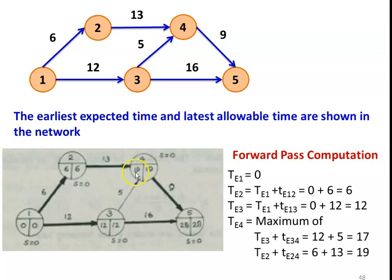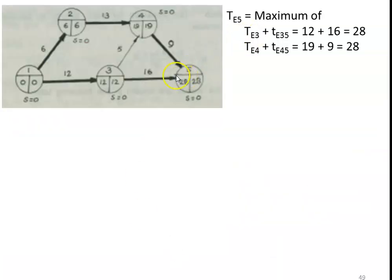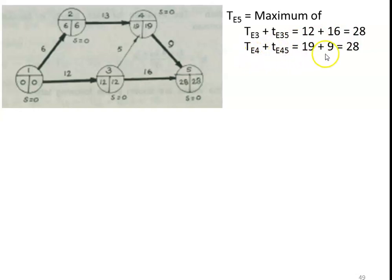So TE4 = 19. For the fifth event, there are again two incoming arrows: TE5 = maximum of (TE3 + t(3,5)) = 12 + 16 = 28, and (TE4 + t(4,5)) = 19 + 9 = 28. Both values are 28, so the earliest expected time for event 5 is 28.